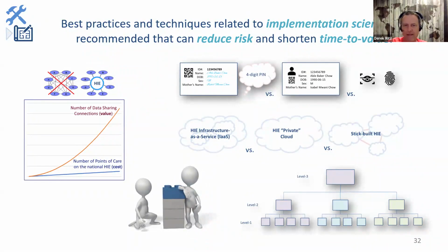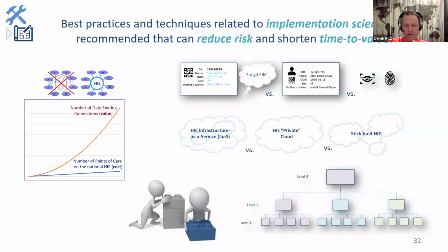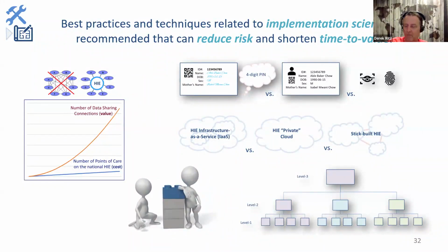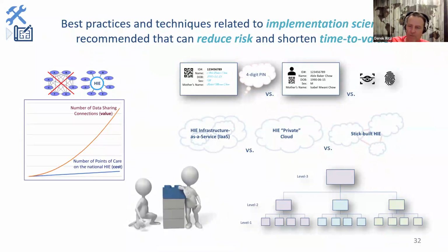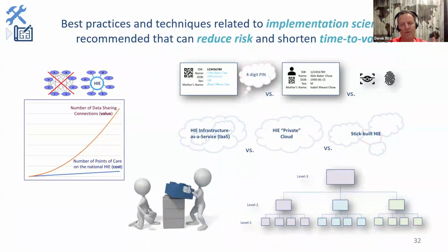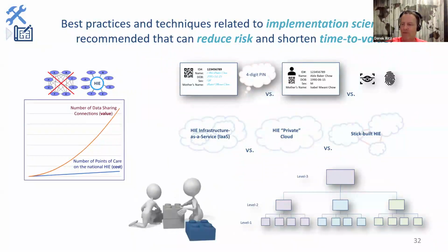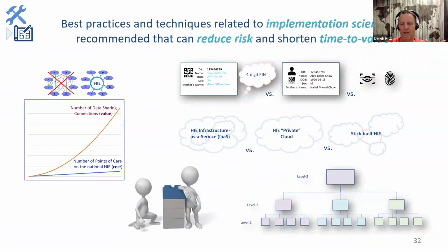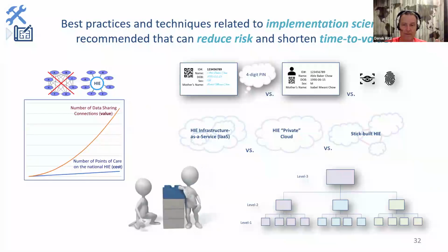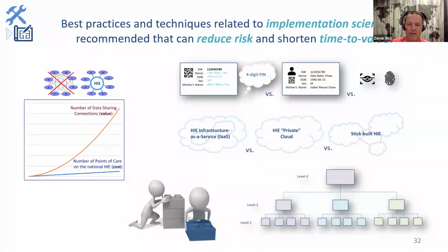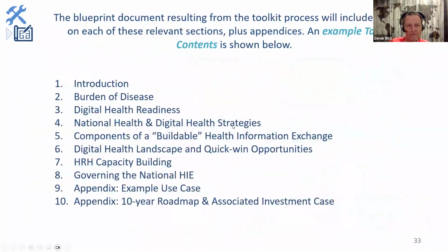Now you can do diabetes care, HIV care, all kinds of things where the course of care is to do lab tests. If you're diabetic, you get your HbA1c, and if your HbA1c is not well controlled, you're given a course of medications. So you put in the clinics, pharmacy, lab, and then a referral network, if you have to do something first. So if you do a critical slice implementation first, even if you're doing a 4-year or 5-year implementation plan, you might have stuff that's lit up and working and delivering benefit after 18 or 20 months. So do critical slice implementations. There are elements of implementation science that can make a real difference and have a really positive impact.